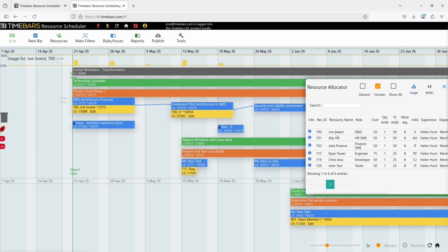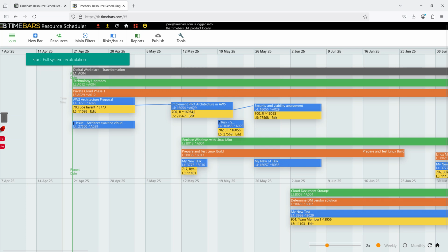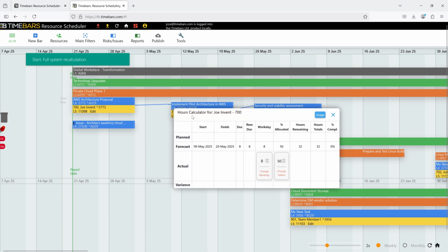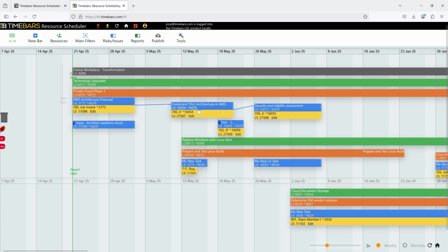Yep. There's something called a resource allocator interface. You use that to assign your team members who are already defined in that pool we talked about to the specific tasks. And does it track effort or cost? It does. As you assign someone, it apparently calculates the hours and the costs automatically based on the rates you put in the resource pool spreadsheet earlier. Oh, wow. Okay, so you get immediate cost feedback while you're building the schedule. That's pretty powerful for keeping budgets in check.